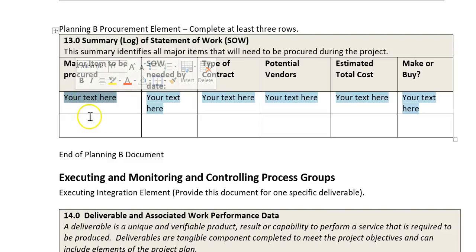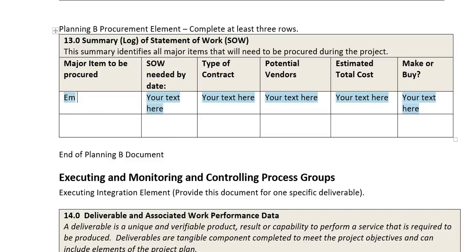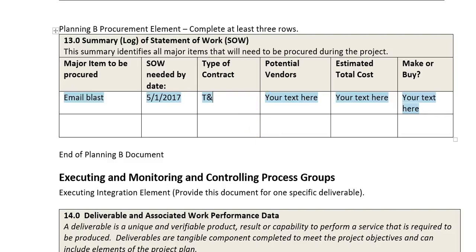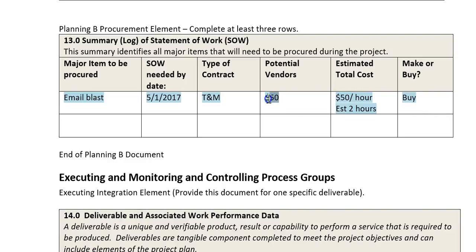If I go ahead and add that to my log of things to be procured, I'm going to have the email blast and the statement of work I need to sign with the vendor. I might need that by May 1st. The type of contract is time and materials. The potential vendor — I'm only going to have one, which is Emails R Us. The estimated cost is $50 an hour, estimated two hours needed, and we're going to buy it rather than try to do that internally. So that's it for the Planning B elements — let me know if you have questions.